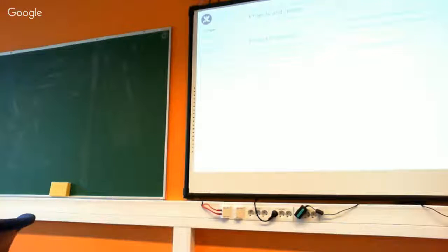Then you will have the same discussions that you will have in any group. So it's not just one picks one, but lift it up a level and say, okay, now we would like to move this piece of software up a little bit in the next sprint. Then you choose the set of features that we would like to do in that sprint, and then you reassign tasks across the whole group. Yeah, exactly. As the headquarter team will do. Besides all the individuals, the headquarter team will have a long-term roadmap and make sure that jointly they bring the software up to where it wants to be.